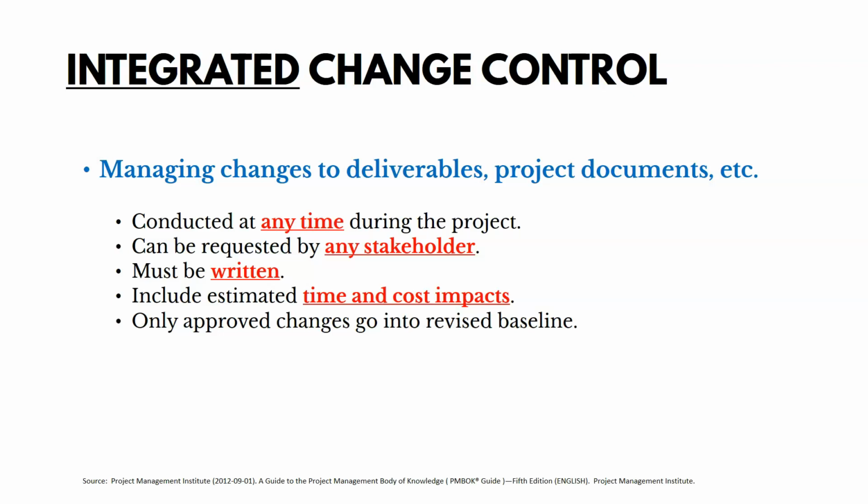It can be conducted at any time during the project and can be requested by any stakeholder, and it must be written. That's really important. It should include estimated time and cost impacts. And only approved changes should go into a revised baseline. That's like our official approved version of our plan for our costs and our schedule and our scope.